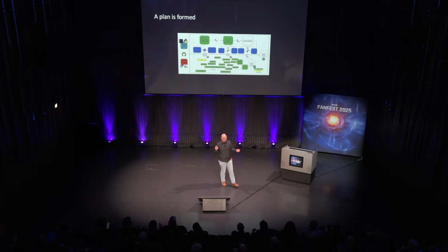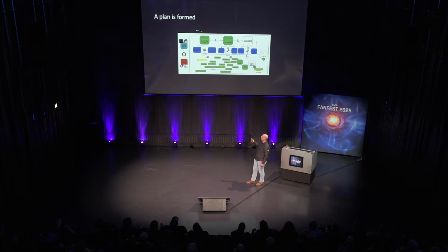This manifested in a plan overview like this. This is actually from relatively late in our development cycle for Python 3, and it was CCP Eamon who was sitting here that actually turned my ugly developer schematics into a more beautiful picture of where we're at. With the divide and conquer approach, you can see here that we split it into two different tracks. The upper track is dealing with those 4 million lines of Python code. Here we partnered with an external partner called Reckon Digital that did a lot of the groundwork on that front.